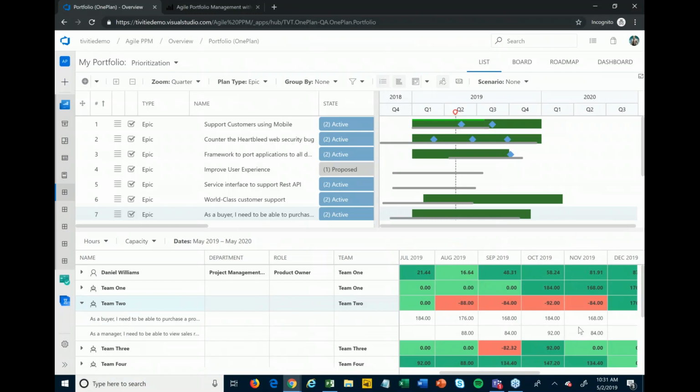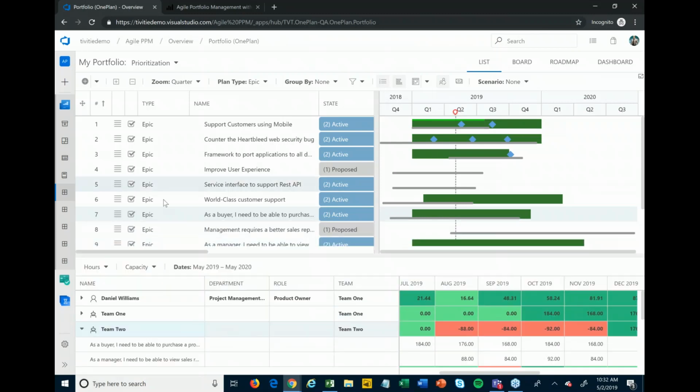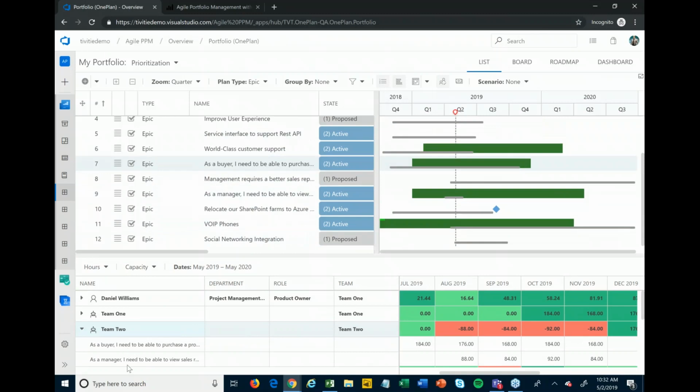So that's a problem. There's a conflict there that we need to figure out how to resolve. Again, we have the same options at our disposal. We can start to uncheck maybe one of these epics and say, what if we don't do one of these, especially if it's lower priority? We can uncheck that, and/or we can move things around, maybe move one of the lower priority ones out a little bit so that there's not that conflict anymore, right?